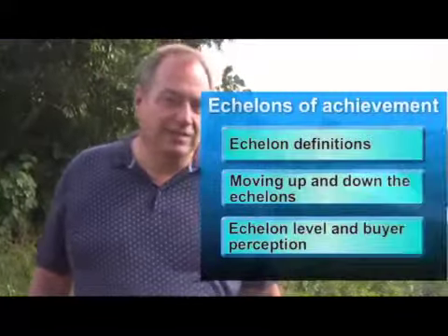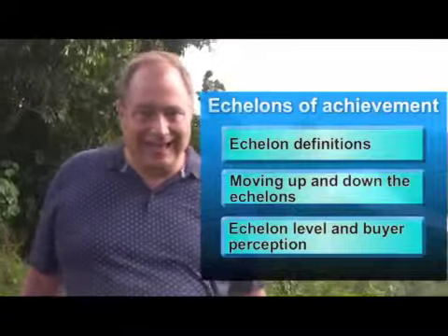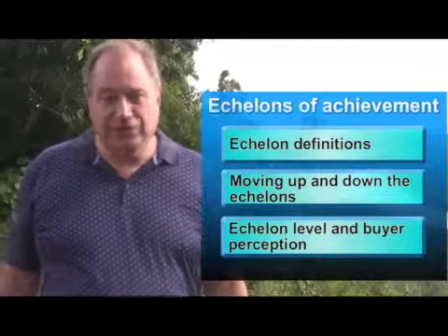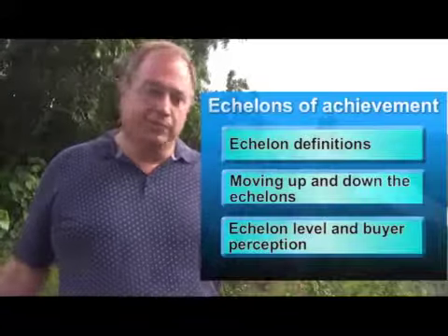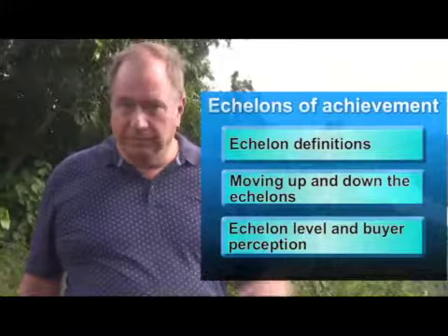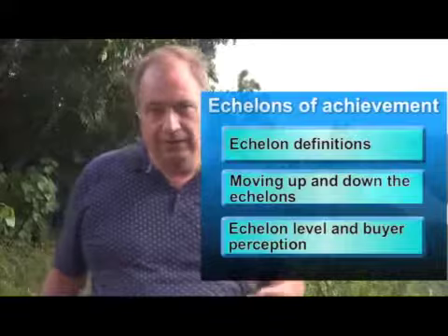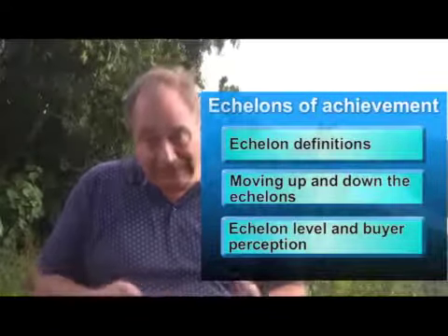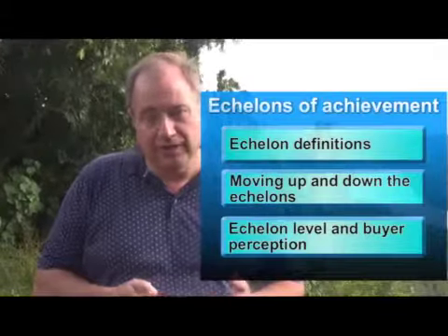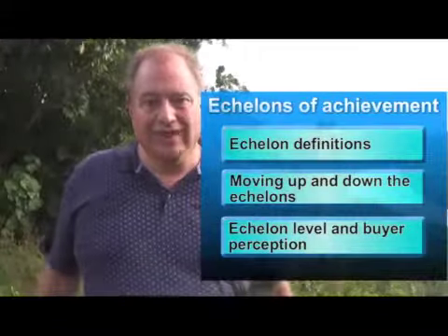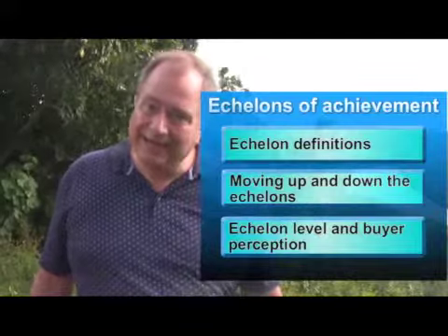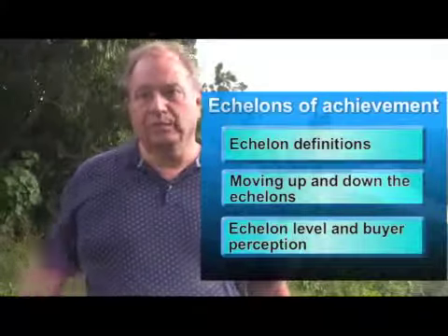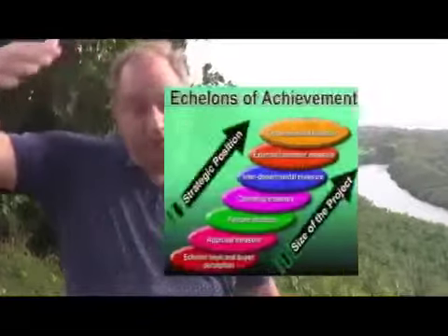All this information we have gathered, we need to have another way to organize it, and that is using the echelons of achievement. So we're hearing about performance pressures from all levels of decision maker. We're trying to match those with a business achievement that would relieve that performance pressure. And we need to sort all this stuff out because all achievements are not equal. Some achievements will be more strategic. Those are the ones we want to talk to senior management about.